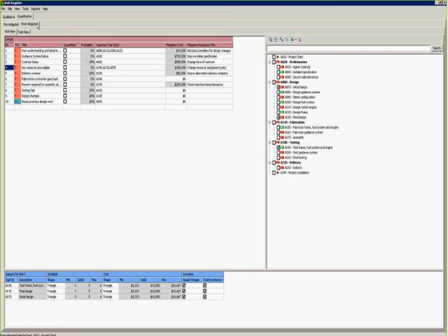Then how do we assign these? So the pre-mitigated and post-mitigated. What these two views say is that we can quantify these, and then after we did it, what did it cost us to actually deal with them? And this enables us to create two scenarios, which is what I was trying to get at with this risk registry. It enables you to compare how your risk profile changes by doing these things versus not doing them.